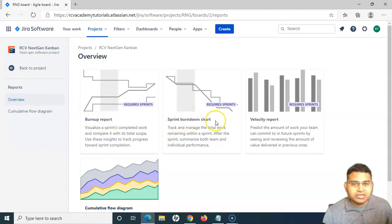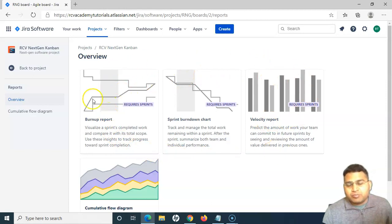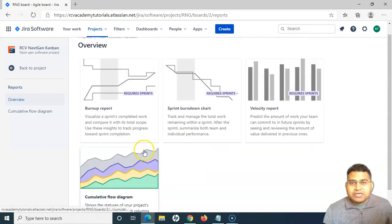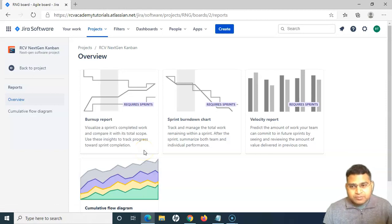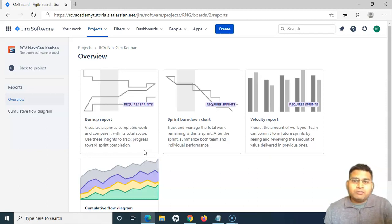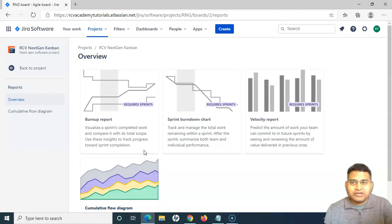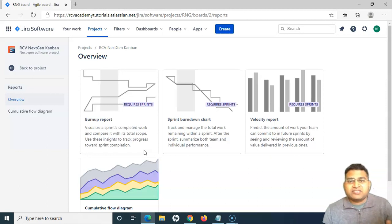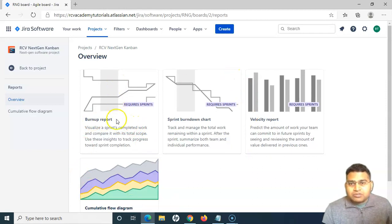The burn up report, sprint burn down chart, and velocity report are more relevant to sprints or iterations. In Kanban there is a continuous flow of work, but you can have your project team working in a two-to-four-week cycle, picking up and finishing issues within that cycle. Usually in Kanban it's continuous flow, so if you are looking for a burn up report or sprint burn down chart, your project should be working in sprints — you should be creating a Kanban project but then creating sprints to manage work within next-gen Kanban.